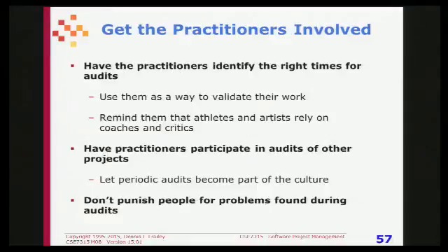Get the practitioners involved in doing audits. For example, where I worked for a number of years, we audited each other's projects just to have somebody from another project look and see if they see something. It was really quite effective. And you don't punish people for problems found during audits, because otherwise they won't cooperate with audits.